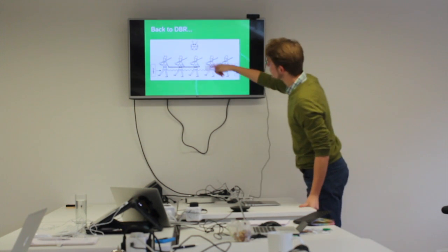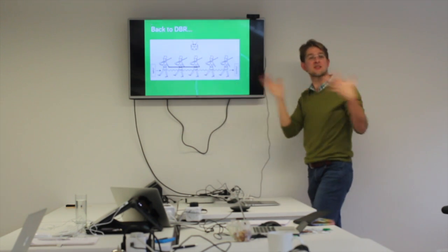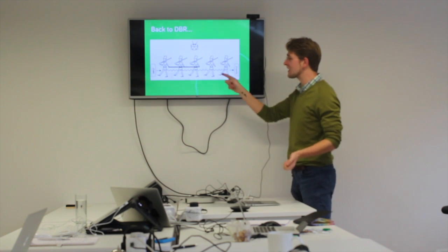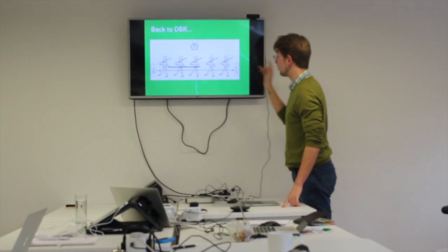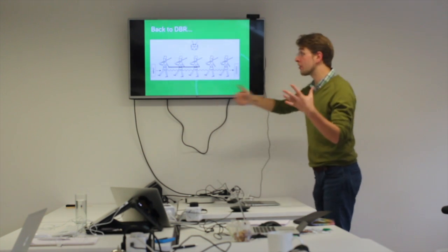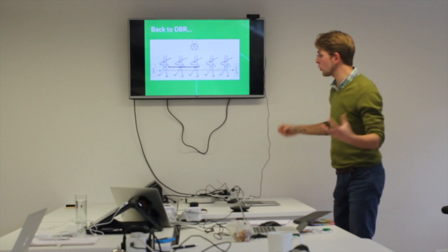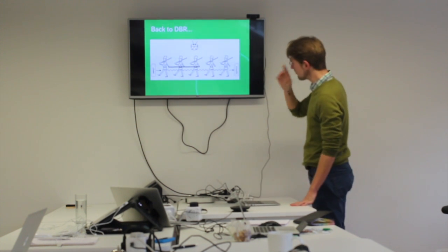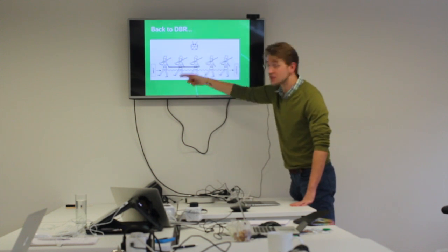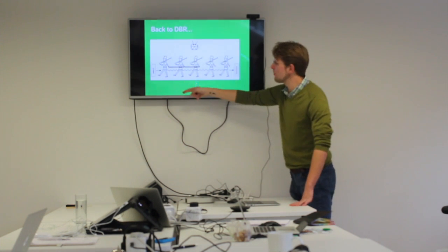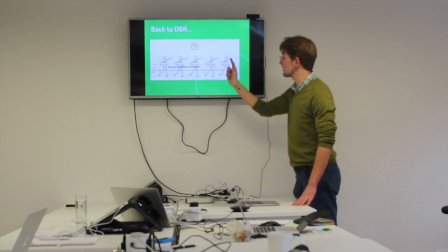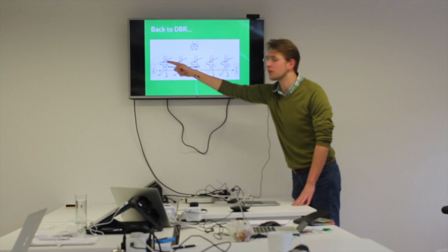If you imagine these soldiers who are marching, this is like the cars that we were looking at earlier, right? We now know that the best way to get the whole system, all of the work that we're trying to service from beginning to end, is for it to move at a consistent pace and for stuff not to get caught up in front of a bottleneck. So that means that we have a drum. If this guy here is the slowest person in the group, then we want him to be banging a drum at the speed at which he's walking, so that everybody else is walking in sync with him and work is flowing through smoothly.